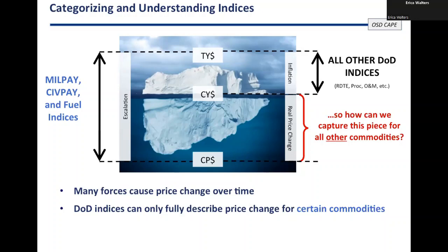The weighted versions will have the appropriation-specific outlay profiles put on top of inflation. So the RDT&E Navy index is going to use the overall inflation index, that same one we've been talking about since the beginning, with the RDT&E Navy outlay profile, that spending pattern over time, laid on top of it.